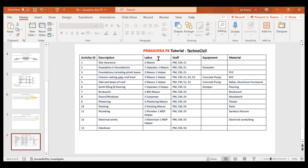Resources are only your staff, labor, equipment, and material — all these things are covered in resources. Roles are designations. For example, there is one person, Mr. Ashish — he is a resource, a person who is an electrical engineer or a planning manager. You assign that person as the resource, but his role will be his designation — Mr. Ashish will be the planning manager or the project manager. So resources are your people, but roles are their positions or designations. Similarly, for labor, if there is one mason, whether he is skilled, unskilled, or professional — these things will be his roles. We will restrict our roles to staff only and not go into depth for labor, equipment, and material. Roles are only meant for labor as well as staff.